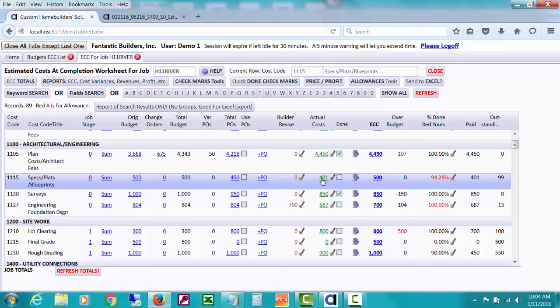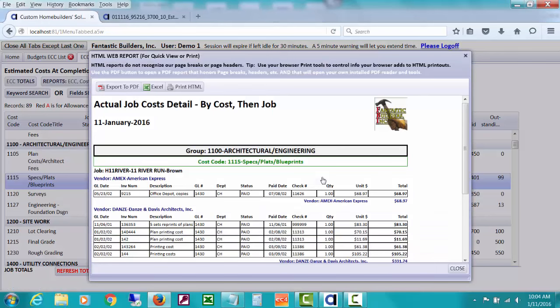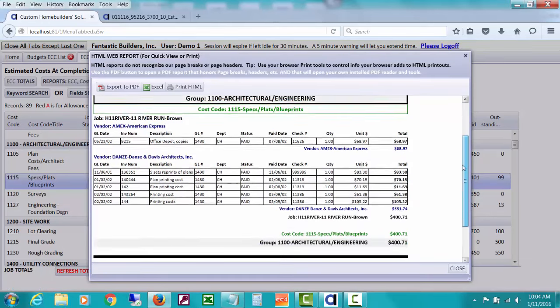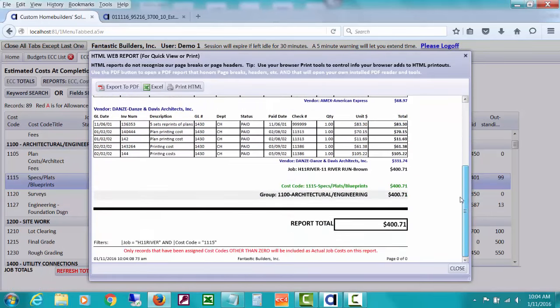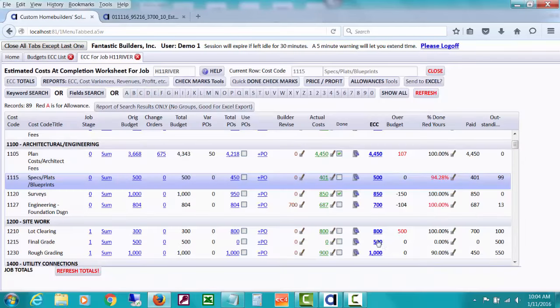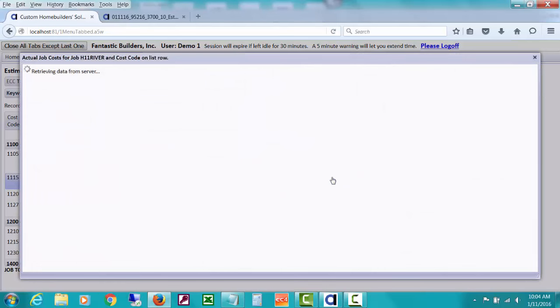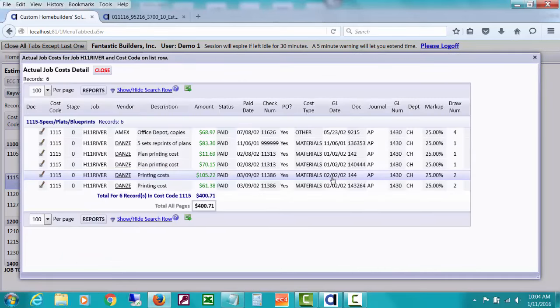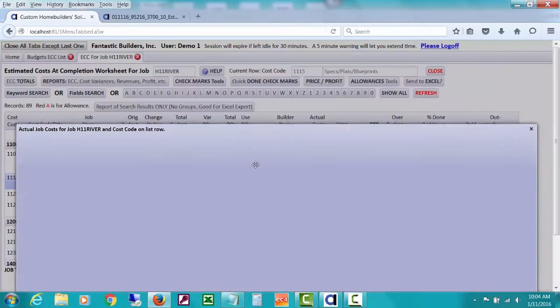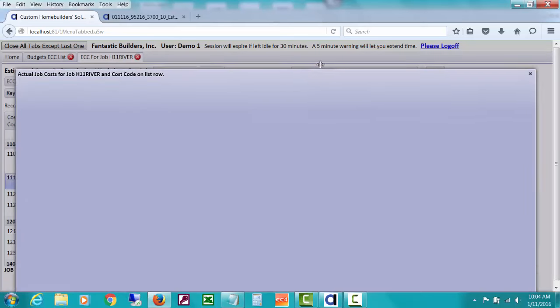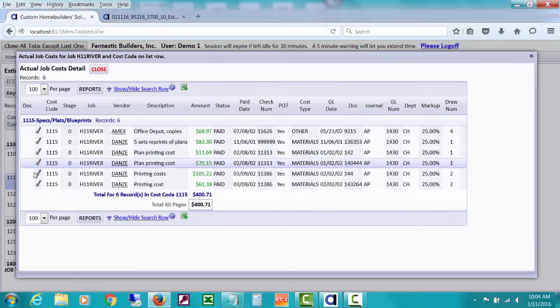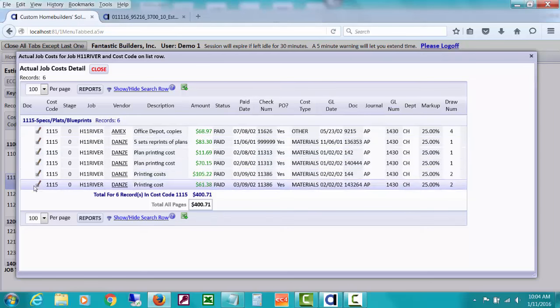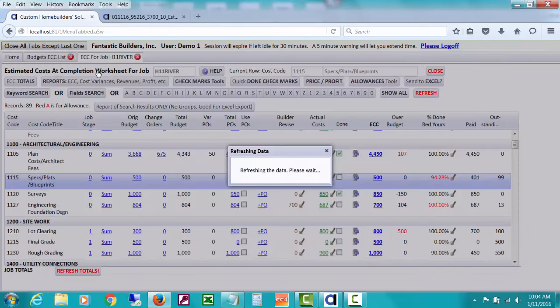This next column over here is for actual costs that have been posted through posting bills. You can drill down on them and see a report of those actual costs and what they're made up of and decide whether or not maybe they are done or you've posted all costs that you're ever going to have. The pencil edit icon to the right that I just clicked of those actual costs will actually open a window where you can do some editing of these actual costs. Like perhaps you need to edit the cost code, it's put to the wrong cost code, things like that. So you can see how you can get to that pretty quickly.